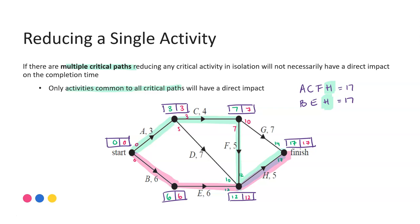If the question is asking what should you reduce H by, you are just aiming to match the next best pathway in the network. That's where the table method can be really useful and a really efficient way of being able to see what that is and how much to reduce by.